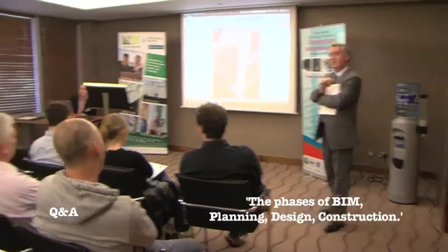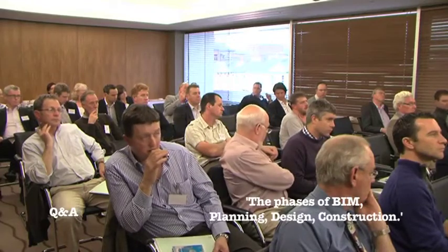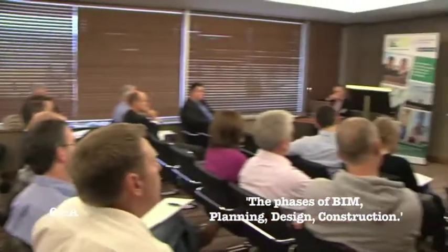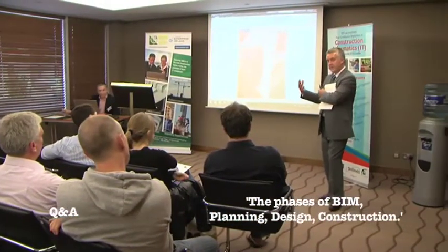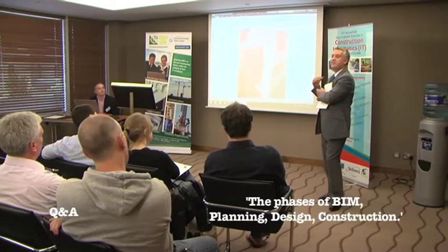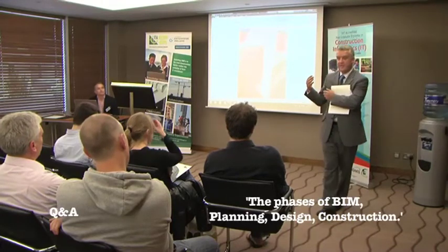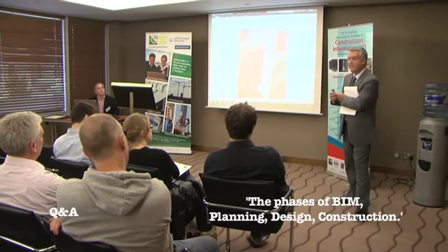Well, just to say, QS applications such as BuildSoft, CostX, whatever, will have modules that will integrate and interrogate the DWF file and extract the information into those applications. So any QS application worth its salt will be able to interrogate these files. Our students unfortunately use CostX with Revit to create their quantities. And now the whole problem with quantities is the trust that the figures are correct.